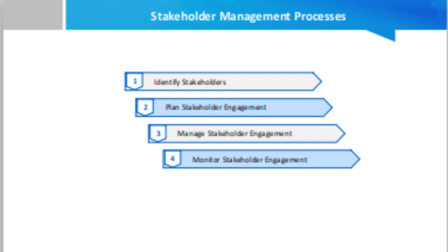So what is actually the engagement plan? For example, you hold status meetings, requirement gathering meetings, and conference calls, say on a weekly basis, you do on-site visits with the stakeholders, and on a monthly basis you hold a steering committee meeting. Basically you are involving the stakeholders, especially from the customer side.